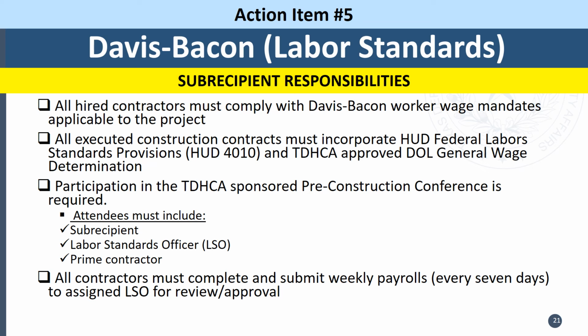All contractors must complete and submit weekly payrolls every 7 days to the assigned LSO for review and approval. In addition, all forms will be made available on the TDHCA website and have been adapted from various sources such as TDA, TDHCA, and HUD. Therefore, these forms should be familiar to most that are attending this workshop. We are still working on finalizing the forms for the CRP program and will make them available on our website to you as soon as we can.